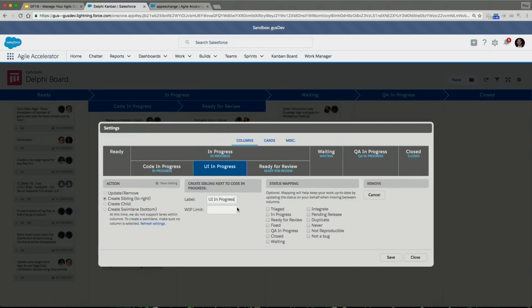It's all very well and good to let a team customize their board, but if everybody had custom statuses, then release managers and vice presidents of your organizations would never be able to run a report because they wouldn't know what to put in their filter criteria. So we have the concept of a global set of statuses that are broader categories. A release manager or QA manager could say, hey, show me all of the P2 bugs that are still in progress. Show me all of the security user stories that we have planned for next release.